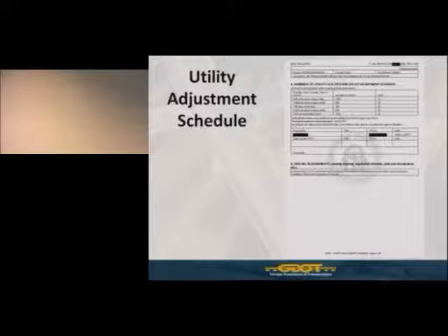So by this example, we don't know, is there 5,000 feet of buried copper cable on the project with 2,100 feet in conflict, or is it just 2,100 feet? This is an example of where the total existing quantity was not completed correctly. An additional request may be made for this to be properly filled out. So that illustrates what I was speaking of in showing the total quantity within the limits of the project as well as the quantity within conflict.